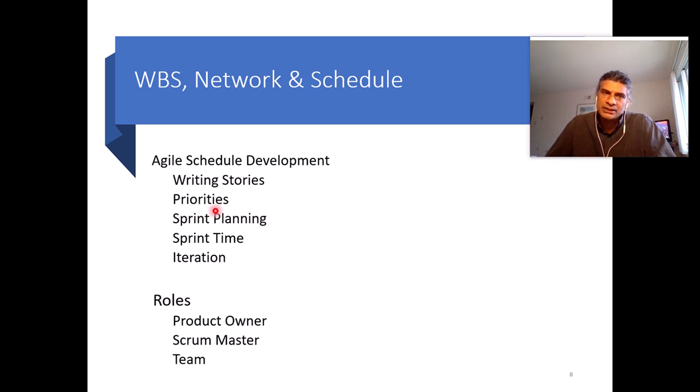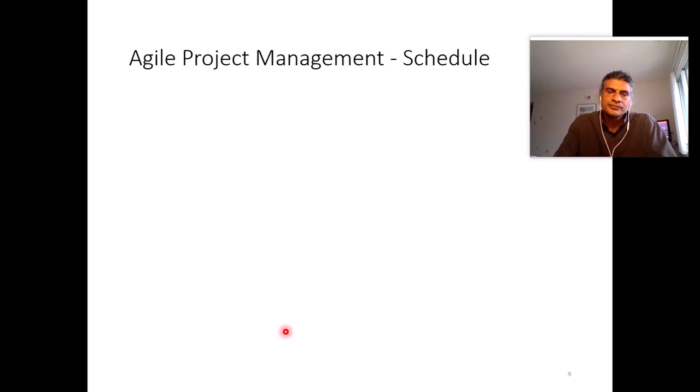Those prioritization discussions usually happen in sprint planning or a backlog grooming exercise. Based upon the planning and the implementation, for each of the iterations we decide how we are going to complete the tasks in 2 weeks, and what we are going to bring up in the next iteration. So each sprint planning will decide the priority and sequencing so that the project can be completed in a certain interval. That kind of defines the way of handling the project in different ways.